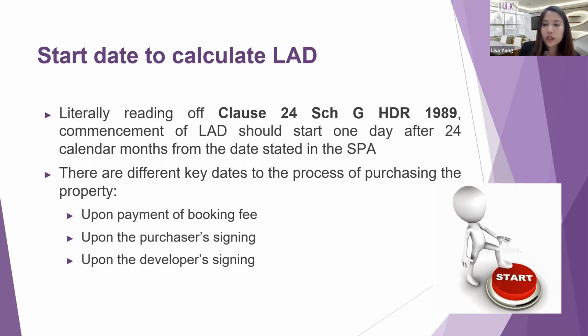In GJH Avenue Sdn Bhd against Tribunal Tuntutan Pembeli Rumah, the Court of Appeal took a literal approach and found that the collection of deposit is prohibited by law. Hence, LAD should be calculated from the date of signing of the SPA.